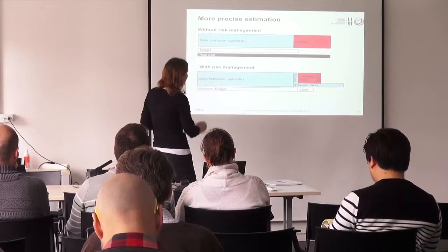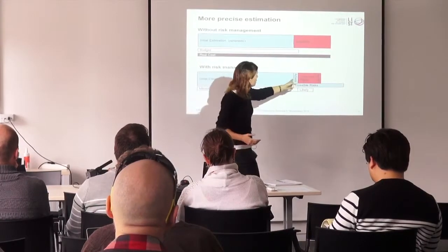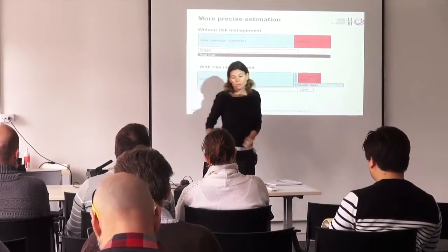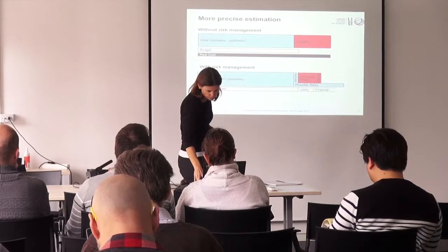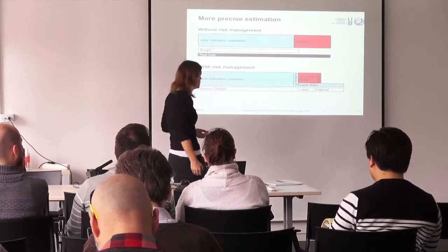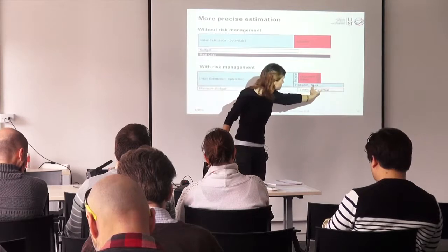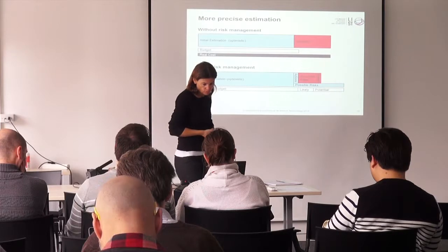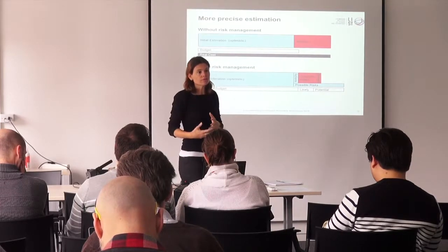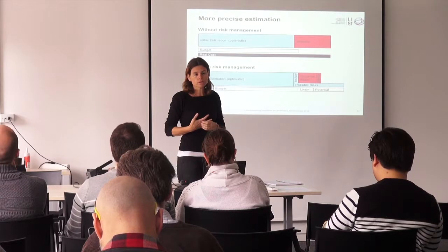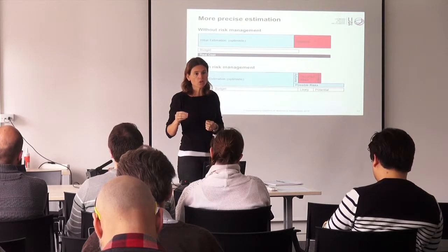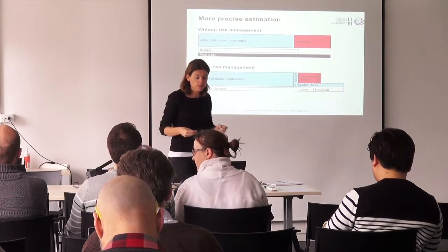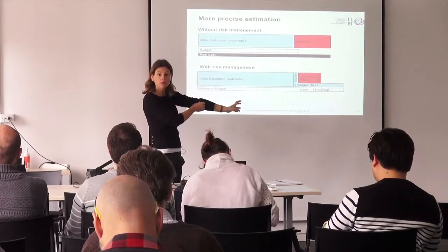At the end, your likely budget is, there are some risks that will occur, so your budget will be between there and there. And totally, your potential budget is really everything plus all the risks that we had envisioned. Okay, so by doing this analysis, you're better on the estimation of your budget, and you're better in the estimation of the action budget.